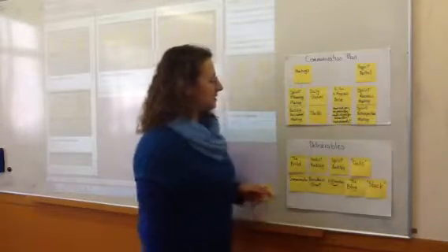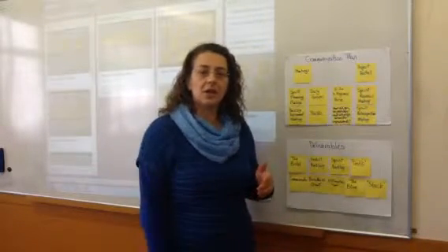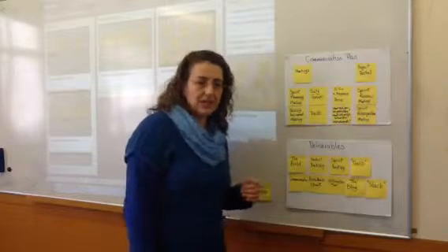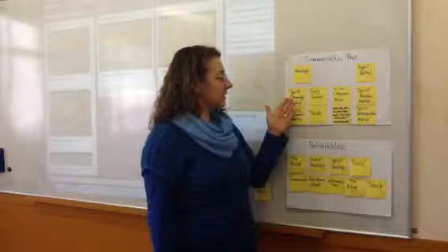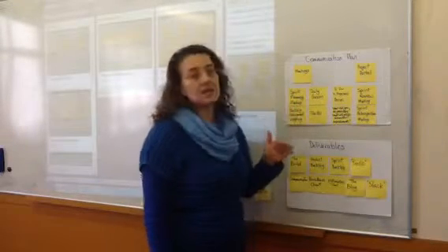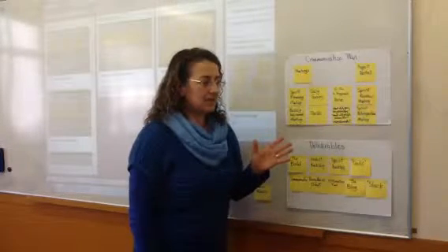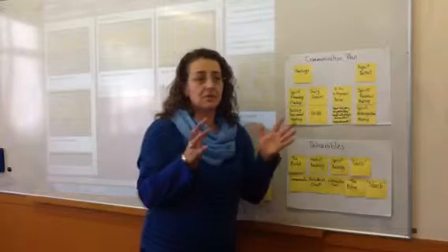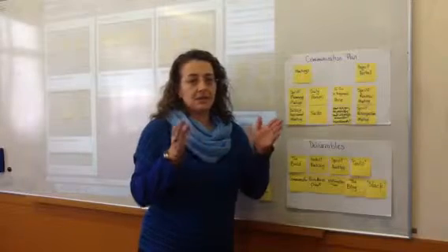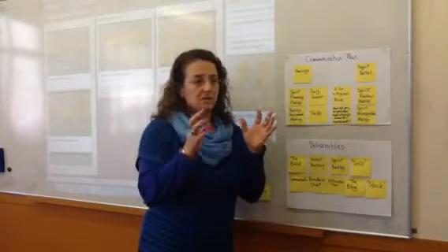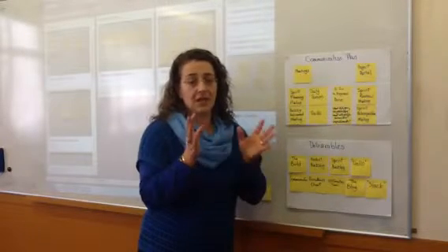The types of meetings we need to have is, well, definitely the kick-off meeting. Again, I'll go through more details of the kick-off meeting we're planning to have, but from that we will need to get together again for sprint planning. Sprints are basically time-boxed events. It could be between 2 weeks and 4 weeks long, and during that period we focus on developing one part of the build and deliver it at the end of that fixed time.